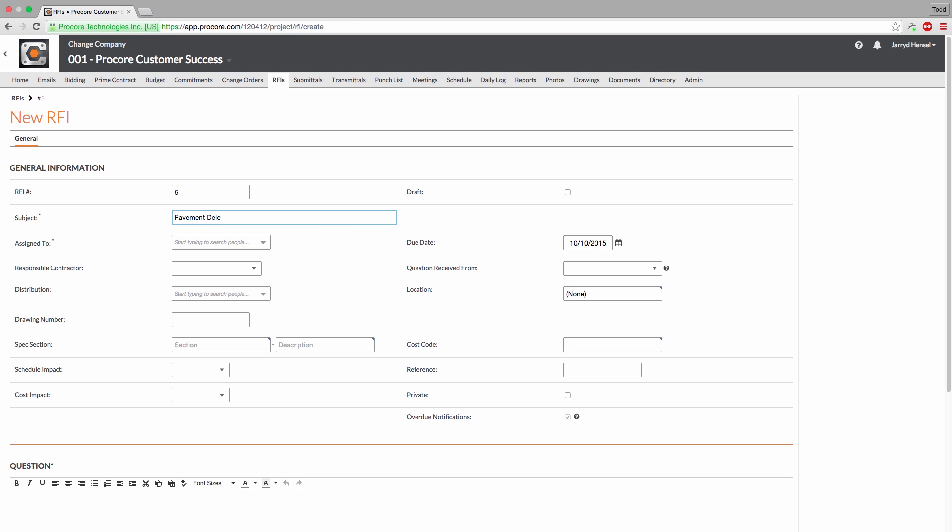If you need to save the RFI as a draft to work on or send out at a later time, you can check the Draft RFI box. A draft RFI can be assigned to the next RFI number, or you can choose to assign it a number later on.